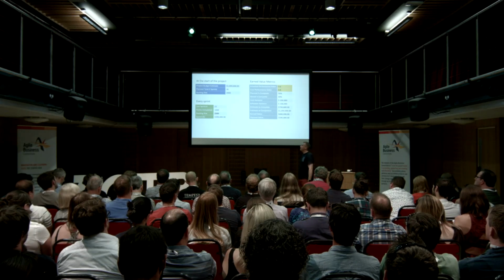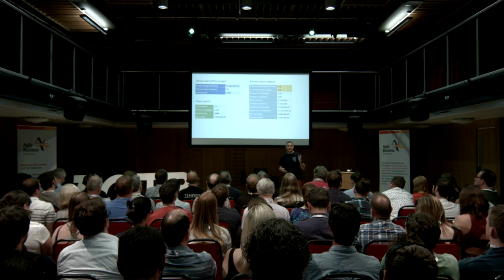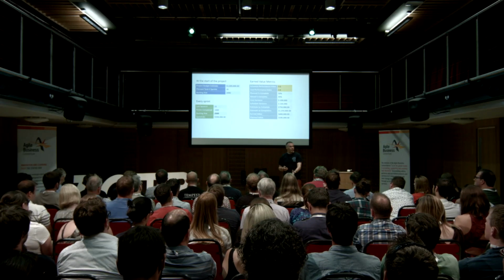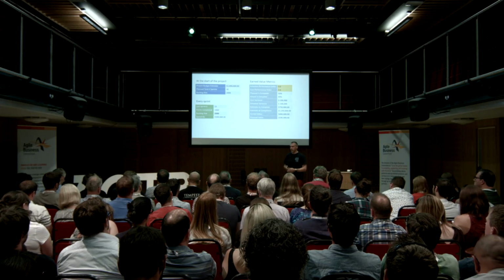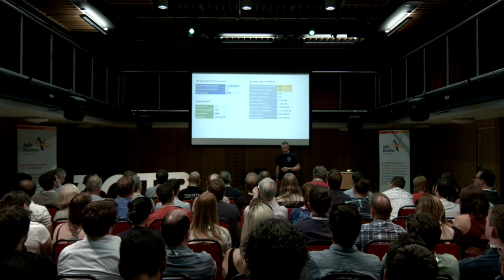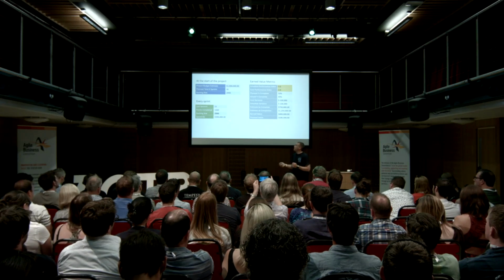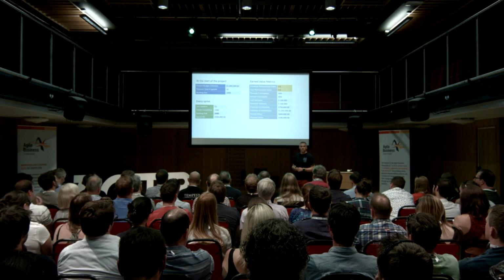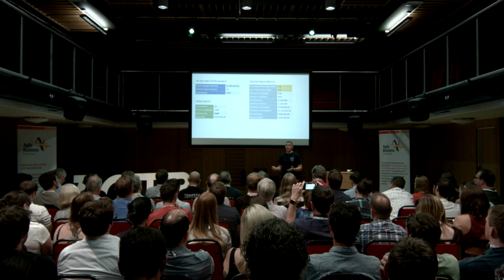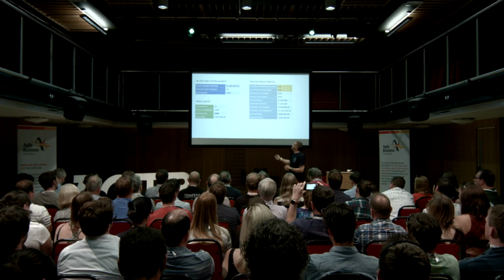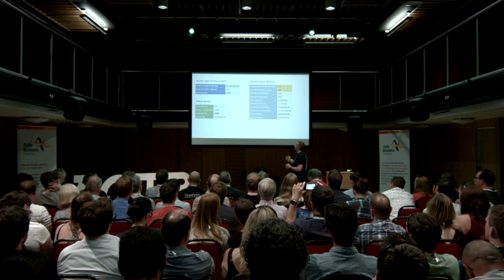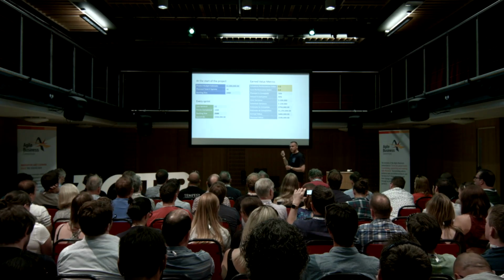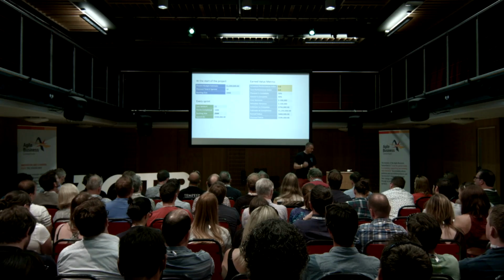If we look at an example here, we're back to where we were. We're halfway through the project. We've delivered 1,000 points out of the 2,000 we started off thinking we had, and we spent $500,000. But at this point, we've started to look at our backlog and realise that it's a bit bigger than we thought. So in this example, our numbers here have dropped down by a less easy number, so they've gone down a little bit.